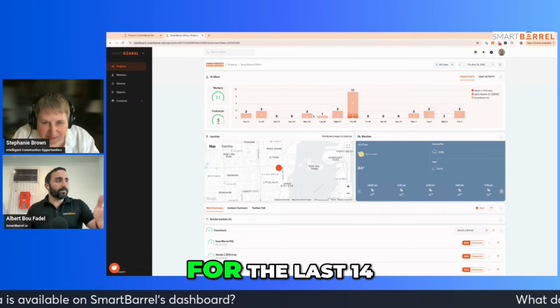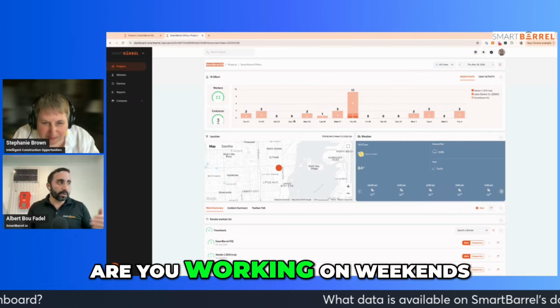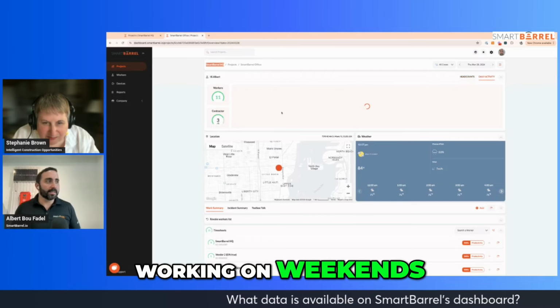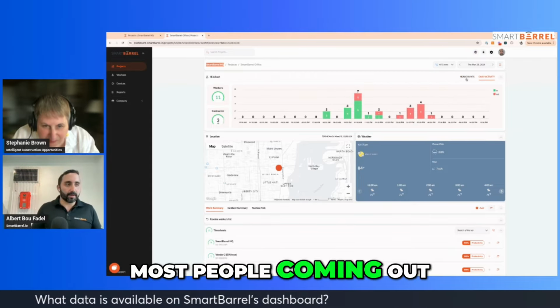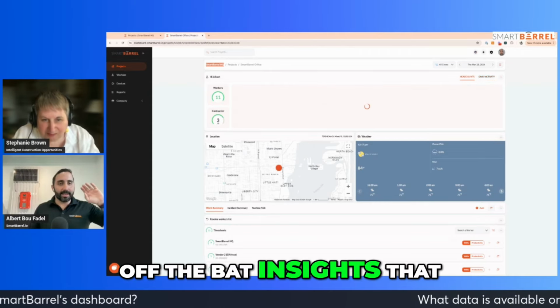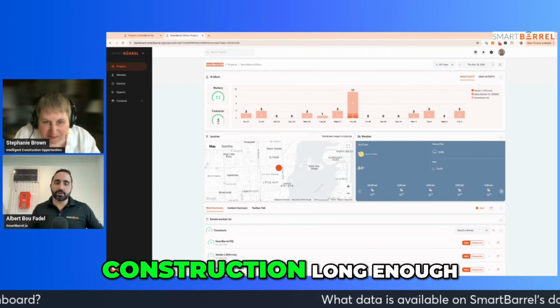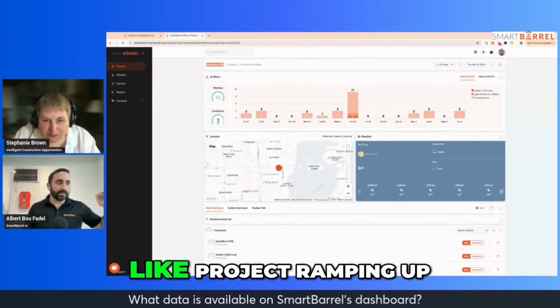Second, you can see for the last 14 days if the project has been ramping up or ramping down. Are you working on weekends? Are you not working on weekends? When's your load on a daily basis? When are most people coming in? When are most people going out? So there are a lot of off-the-bat insights that, if you've worked construction long enough, just by looking at this, you have half the story, right? Okay, is this project ramping up?